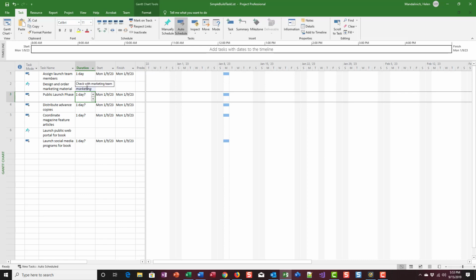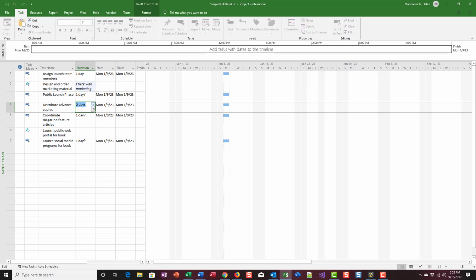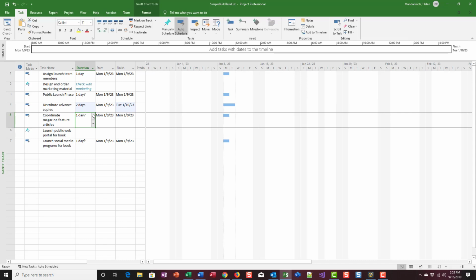Right? Because we don't know. Public launch, leave as 1 day, question mark, because we don't know. Distribute advanced copies, we're going to make that 2 days. Coordinate magazine features, we're going to make that 6 days. And that's it for now.